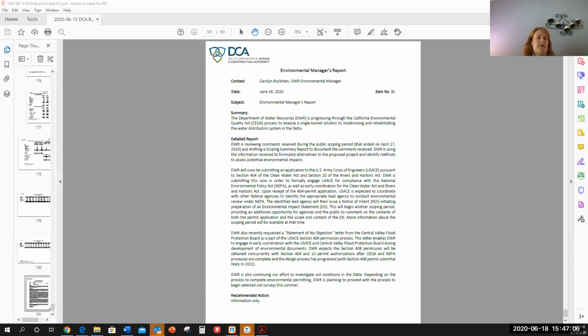We posted it on our website today with some questions and answers to help people understand what it is. We think there are probably a number of questions because often the 404 permit doesn't come until later in the process, and the permit decision this time, again, will not come until much later in the process. We submitted it now to help initiate this NEPA process, but there will be no decision until after CEQA, NEPA, and other permitting efforts are complete.